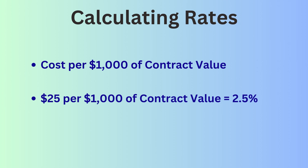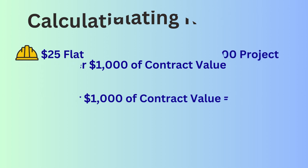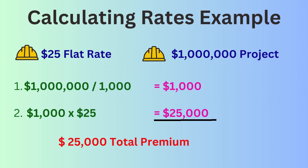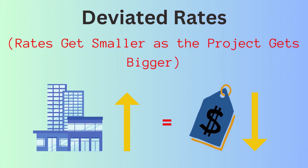Now that we have discussed what factors go into contract bond rates, let's look at how they are calculated. Surety bond rates are expressed as a cost per $1,000 of guarantee. For example, if an underwriter quotes a $25 rate, it is $25 per $1,000 of contract value — a complicated way to say 2.5%. If you have a $25 flat rate and need a performance bond on a $1 million project, you divide $1 million by $1,000, which equals 1,000. Then multiply that 1,000 times the $25 rate, giving you $25,000 as your performance bond cost.